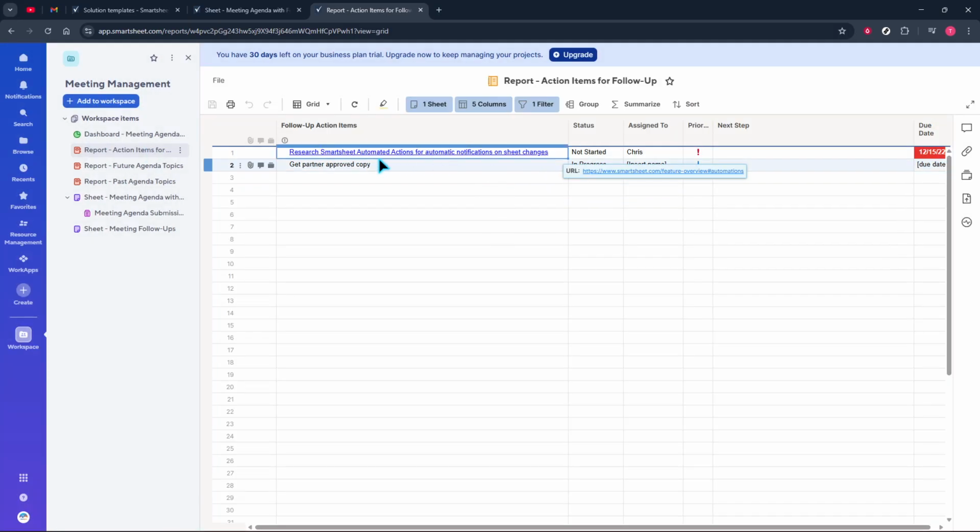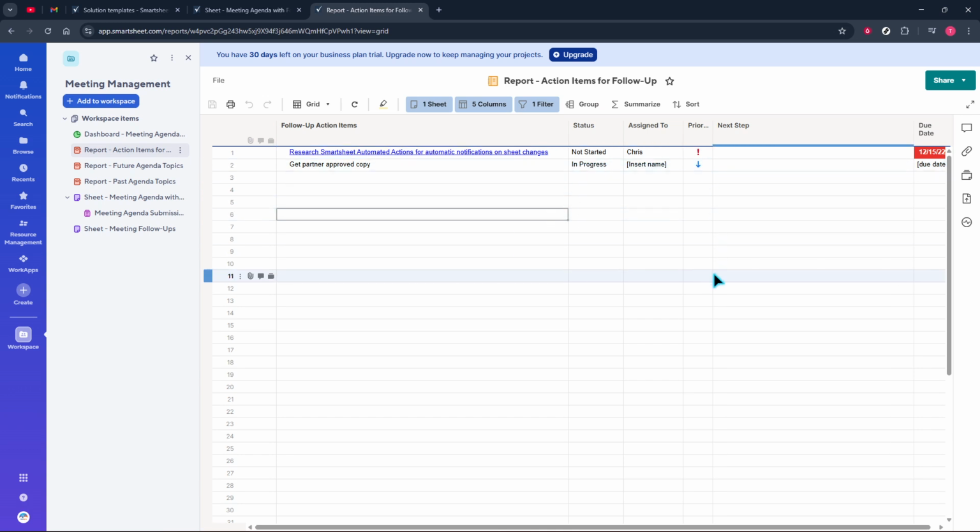This template is also structured to help you manage risks, actions, and decisions in one place, often called a RAID approach. Use the risks area to record potential blockers before they become issues. Note what could happen and why it matters so the team can watch it.